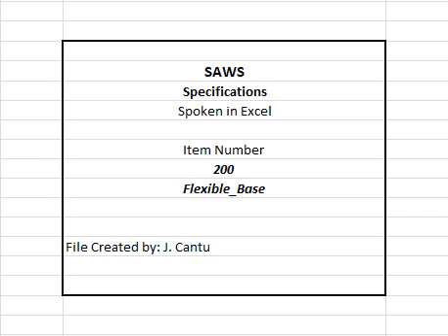10. Any failed test shall require the contractor to remove and replace that layer of material to a length 50 feet in both directions from the failed test location. The contractor shall be responsible for all costs associated with the proctor and density tests, and for providing to SAWS and consultant, if applicable, verification that necessary compaction levels were achieved. 11. These tests shall be performed by a nationally accredited, independent testing laboratory. 12. If the material fails to meet the density specified, it shall be reworked as necessary to meet the required density.